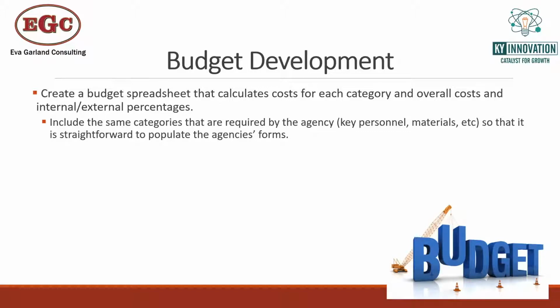What we recommend overall, when we're working with clients on putting together a budget for a proposal, first of all, is to create a budget as early as possible in the process, at least a rough draft. You can put in placeholders, but make sure that the budget is aligned with the budget restrictions. What we'll see sometimes is a client will put together a beautiful scope of work, a wonderful proposal, and then when we budget it all out, it's 800-900K, which is well beyond what a phase one can achieve. And now you're going back in and trying to figure out what to cut.